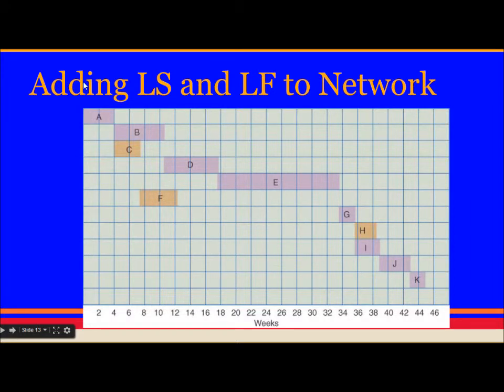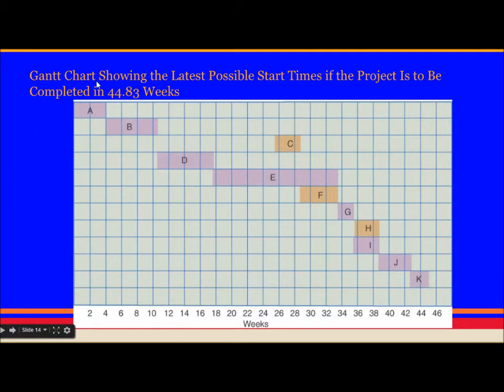And this Gantt chart is drawn using late start and late finish to the network. This also completes at 44.83. Gantt chart showing the latest possible start times if the project is to be completed in 44.83 weeks. Every activity is at the latest possible start time.